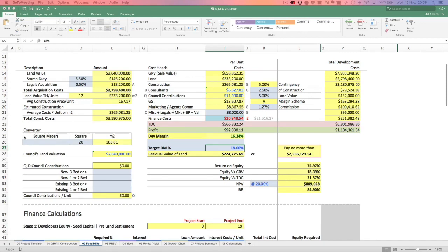He basically makes sure that all the trades and everybody comes on the site properly, and they come when they're scheduled. And the construction management plan that needs to be endorsed, putting it together, getting it endorsed with the council, all those things Igor handles once we start building on it. So we have a site manager, his name's Rob, and hopefully in the seminar next year I might be able to introduce you to my entire team, and then from next year everything just becomes one, in one big umbrella.